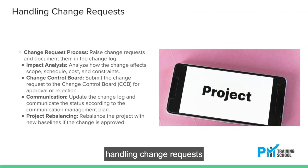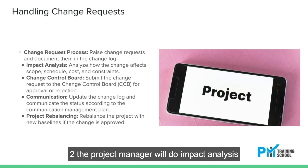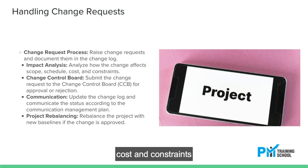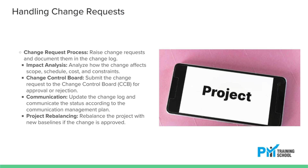Handling Change Requests: 1. All changes must be raised and put in the change log. 2. The project manager will do impact analysis, checking how the change impacts scope, schedule, cost, and constraints, and send it to the change control board.